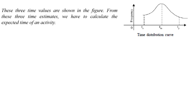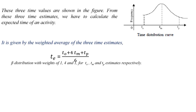These three time values are shown in the figure. From these three time estimates, we calculate the expected time for an activity. It is given by the weighted average of the three time estimates: Te = (T0 + 4Tm + Tp) / 6.